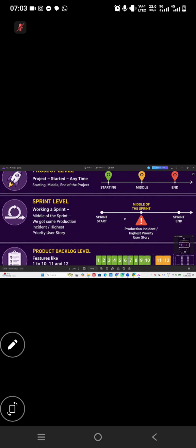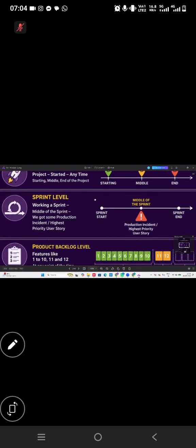Let's say production incidents are nothing but your application, let's say the Amazon application, is live. We are working on the backend, on the development. If any critical issue comes from production, let's say when I'm trying to place the order, they are not getting added to the cart, that is a critical one, right? Production issues are the critical ones. So whenever there are the highest priority issues, we are good to accommodate them in the middle of the sprint. Got you? This is what we are talking about.